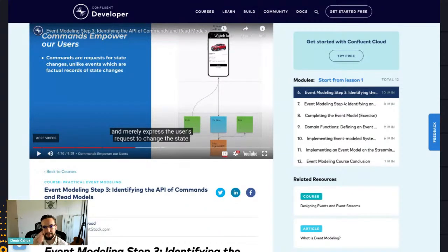Right? So it's the timeline. The data flow is going left to right on the bottom, and the backend to front end to backend flow is going top to bottom. So this is very easy when you have these sort of axes on a project diagram, because you can decide, oh, actually, that last part, when we get to the checkout and we set reviews, that's what we want to demo next. We just take this vertical slice, and everything before that we'll just mock.